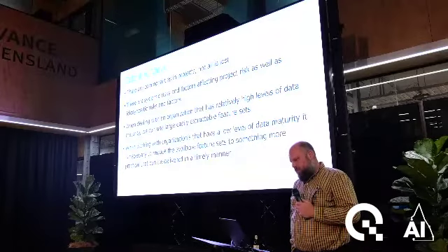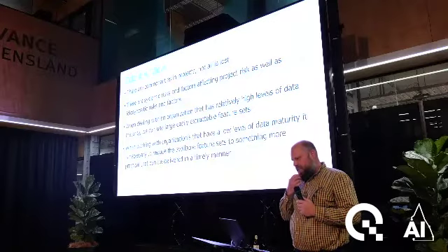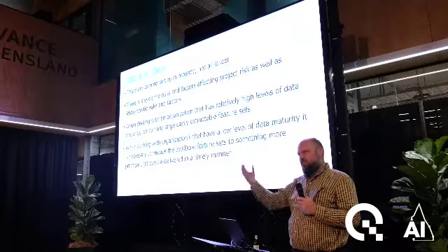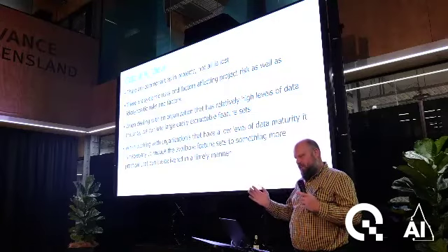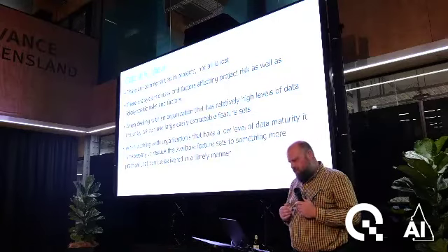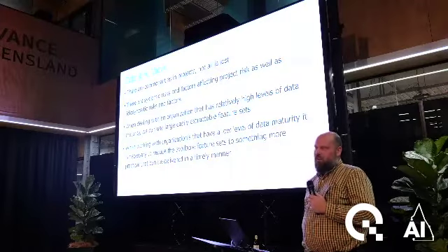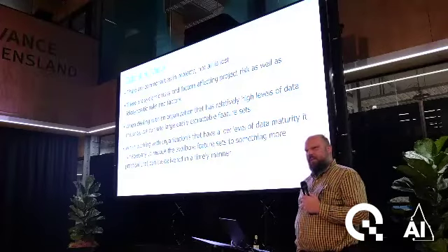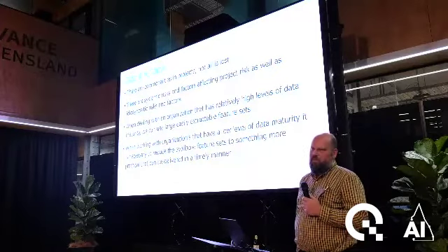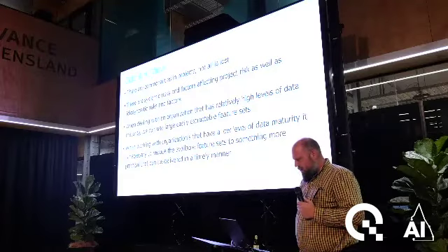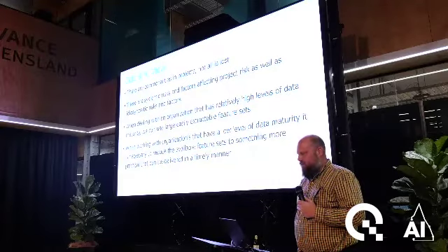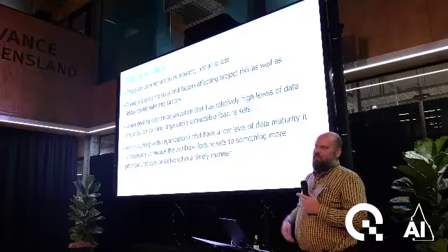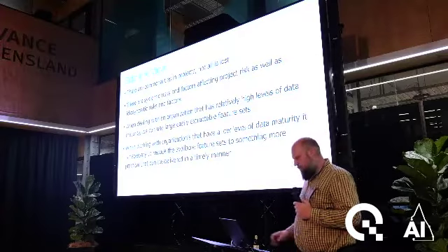Now, what we find is that when we're dealing with an organization with high levels of data maturity, they've valued their data and produced databases, and you can write SQL queries and bring this data out easily. You may have a large extractable set of features that you could use in your models. But when you work with companies that aren't on that level and probably aren't even valuing their data, that creates a barrier to entry for them. You can't apply those very technical models with large feature sets. So to gain access to those customers, you need to reduce your feature sets to something common that they'll be collecting. For example, you might look at accounting data or management accounting data.